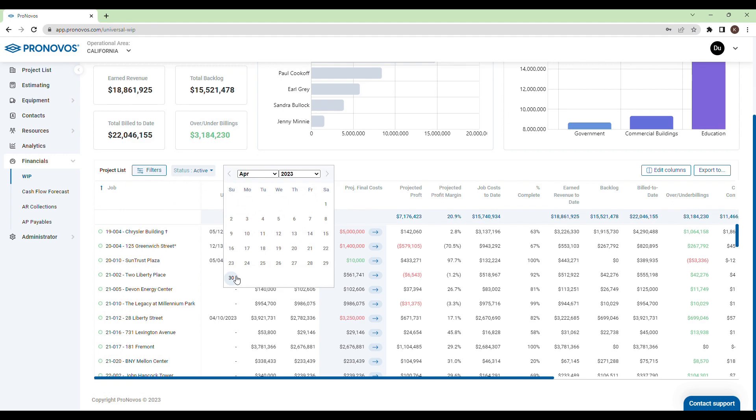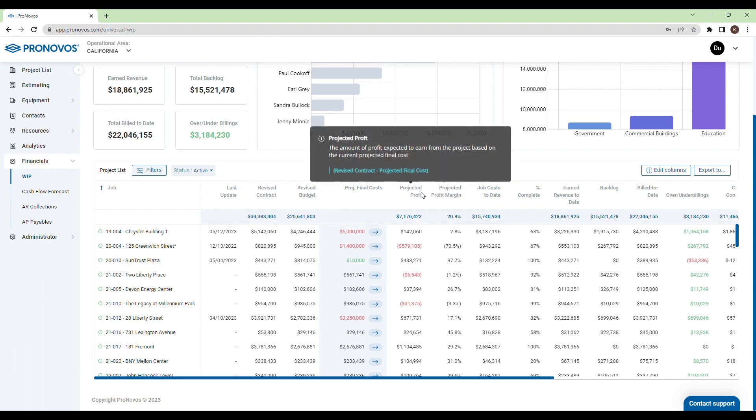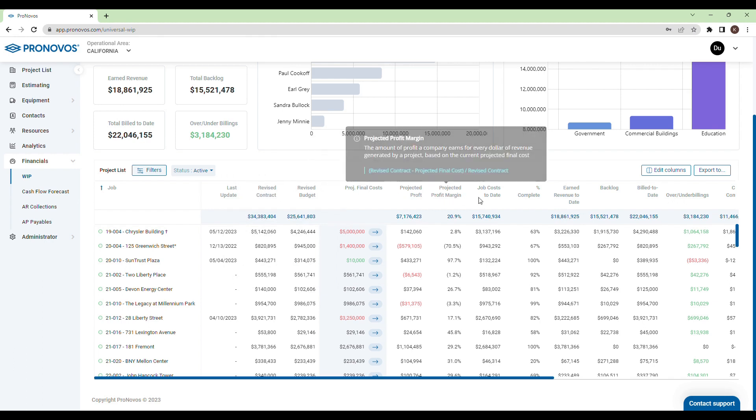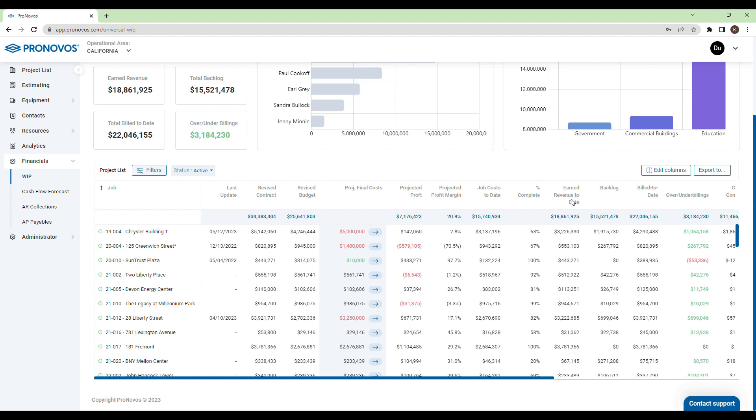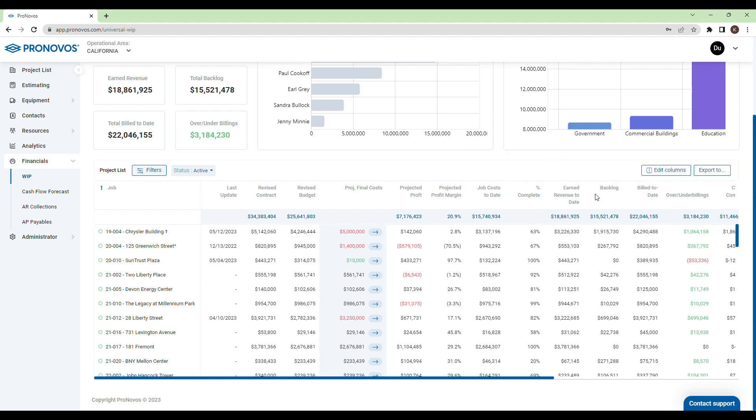The project list provides all standard WIP report columns such as profit margins, job costs, earned revenue, percent complete, and over or under billings.